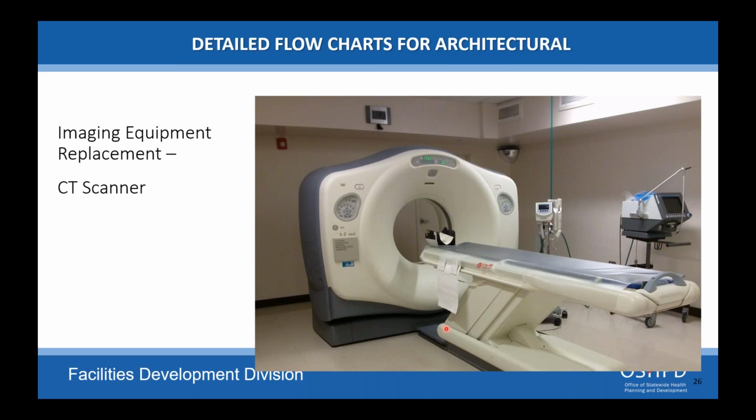We are working on clarifying options for interventional, but as of right now, it directs you to 1224.28 for supplemental surgery. So that's been a big deal, because what happened, they added the definition for interventional. They added into the definition the term image guided. So a lot of these types of equipment have image guided facilities that are used for treatment, and they're considered invasive at this point in time, and do trigger some additional requirements.